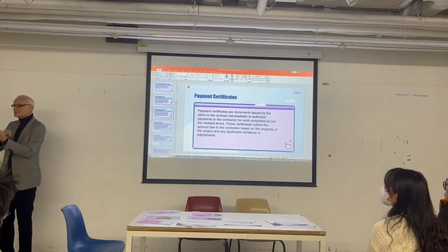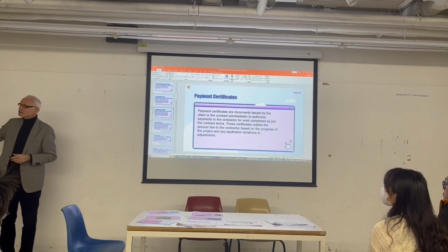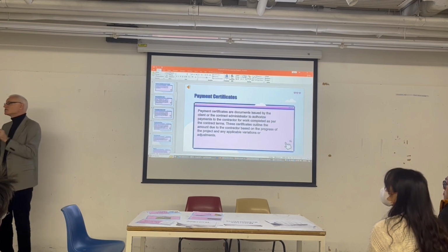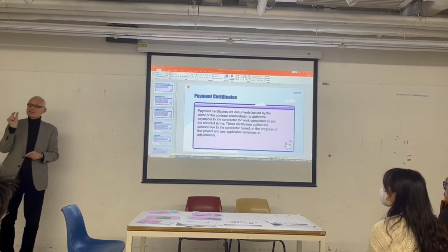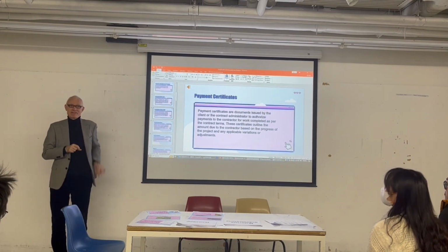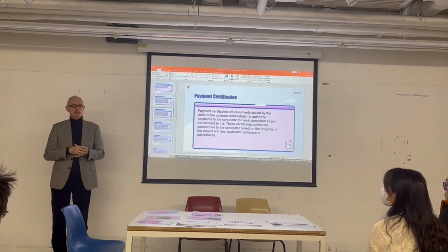Maybe 1% designing, where you have to make a variation. And then you've got to design it, as you nicely said, so there's no extra cost, because the client won't be very happy. Yes, you have contingency, which is a very good point. So normally in the budget, you'd have an extra little bit, but you don't really want to use that. That's only for emergencies. And if you cannot spend all the contingency money, we're happy.